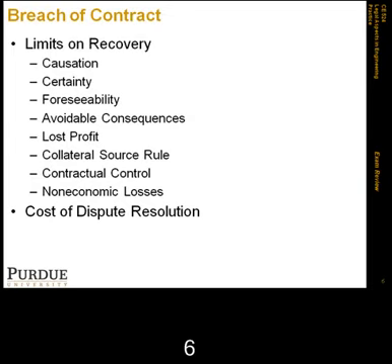In general, American law does not transfer the prevailing party's attorney's fees to the other party, because it's based on the reluctance to discourage people from using the legal system and courts. However, sometimes defective work claims based on deceptive trade practices lead to what we call expanded remedies.